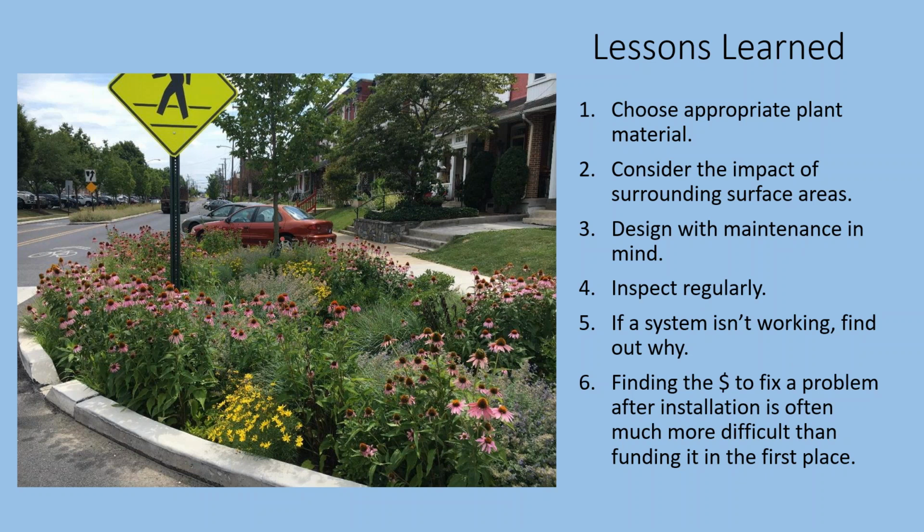Do your regular inspections. If it's not working, try to figure out why it's not. And then once you've figured out why something isn't working, retrofit to fix that problem, and then incorporate those changes into any programmatic or design documents that you might have going forward.